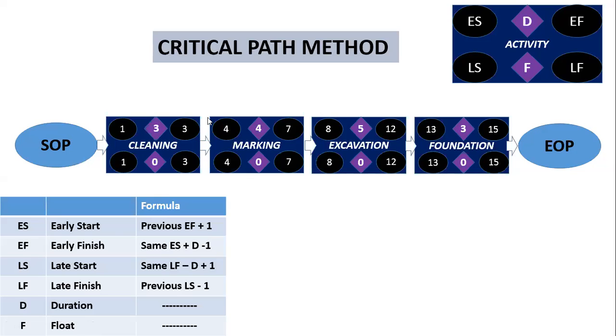We can't start marking on the third day itself because the cleaning activity ends on the third day. We need to start marking on the next day. That is 3 plus 1, the 4th day. Got it?